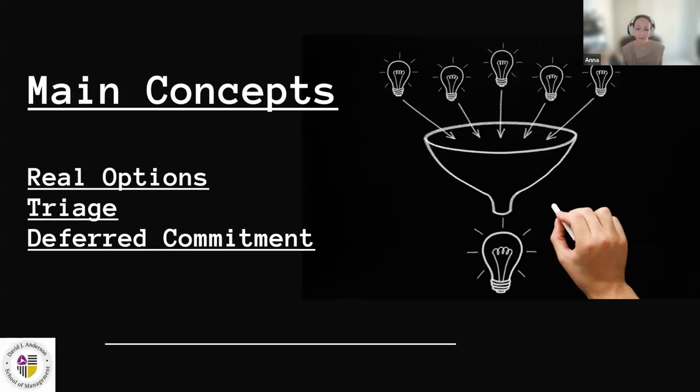Option to invest means that when we analyze the work item, the piece of work that we discussed with the client, whether it should be done or not, we see that this piece of work really brings value to our business and to the client, and that it makes sense to do this. And we know this with low uncertainty. So this is quite clear to us: it is something that we should work on because it's bringing us value.